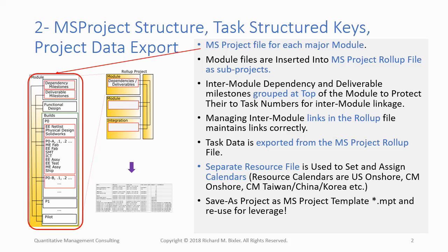Having said that, an MPP file can be created for each major element or process or collection of related smaller efforts. Several examples. Each MPP file contains a GANTT for a major function like a PC board for DSP, or it could contain a collection of GANTTs for efforts with closely related design and logistics, like backplane plus power distribution elements. An MPP might contain a GANTT for chassis front mechanicals plus a GANTT for chassis rear mechanicals plus a GANTT for full chassis assembly. An MPP might contain a GANTT for a major software module like client connection software, or for a data transport method, or for a PCIe driver.